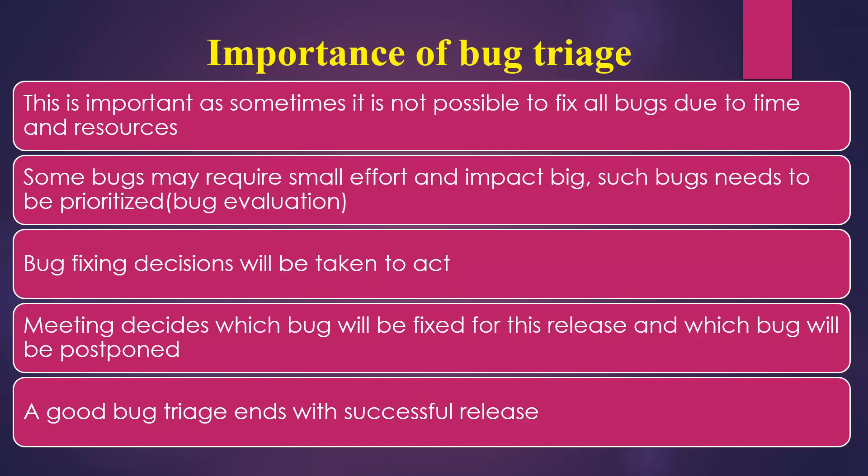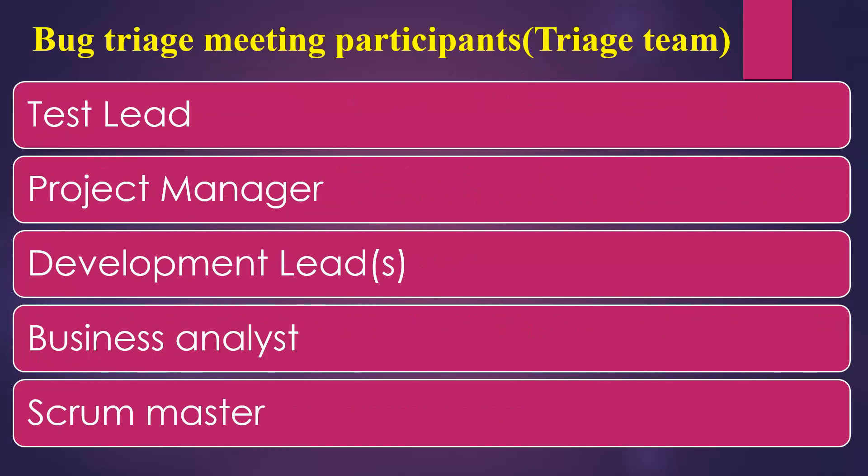A good bug triage ends with a successful release where all priority bugs are fixed. The bug triage meeting participants, also called the triage team, are the decision makers who decide which bugs need to be fixed for a given release. The people who participate are the test lead, project manager, development lead or leads, business analyst, and a scrum master if you are following an agile process.